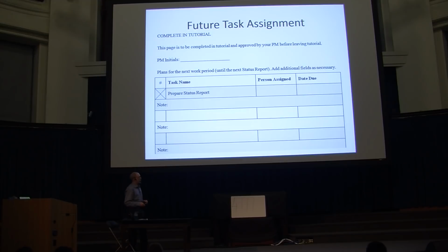So again, future tasks. So then the status report is what's done, what kind of problems and things we're encountering with what's happening presently, and where I expect to be the next time we have a meeting. These have been revised somewhat in software. Anyone that's doing software will probably encounter agile software where there are these scrum meetings where this kind of review, looking forward, looking back, are critically important.